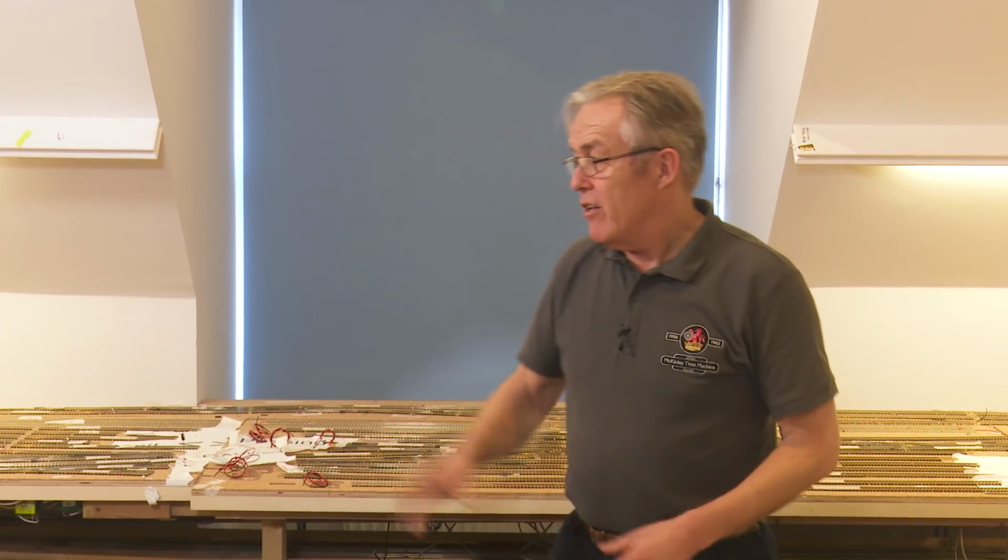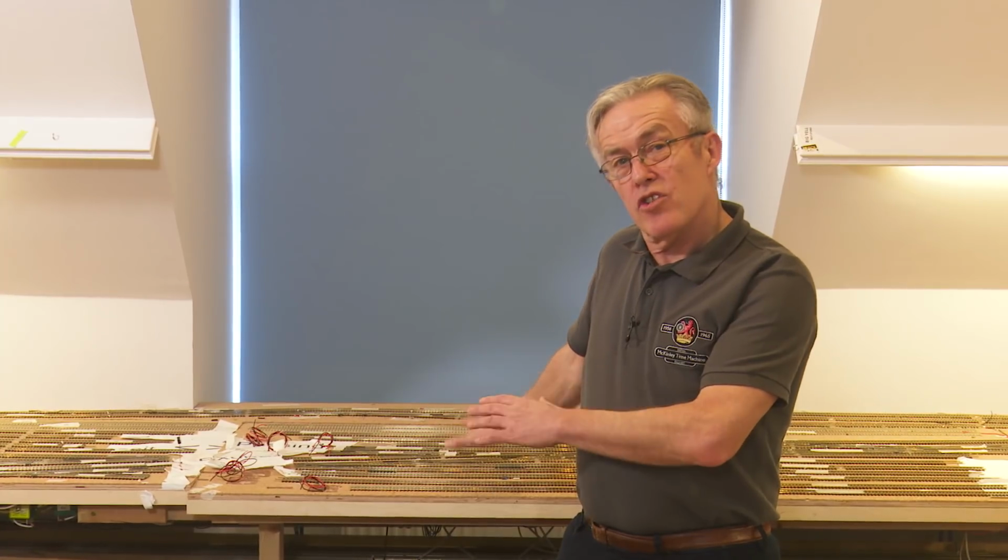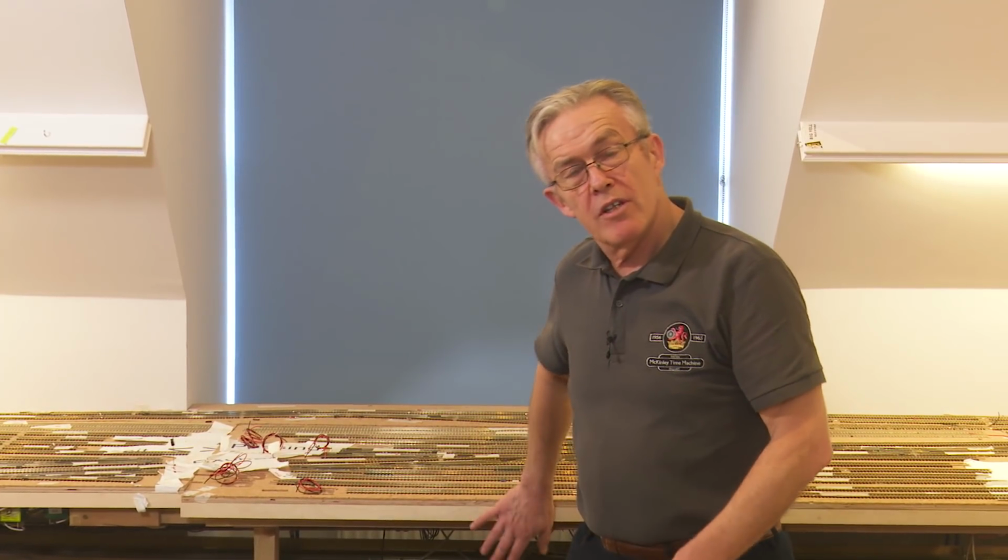All joking aside, what you see here, this is the Sheffield bit in terms of from the boards up to laying the board, so putting all that temporary track work down to prove the design that Malcolm built, designed, testing that we can operationally run it, taking it all apart again and actually wiring it all up. I wouldn't be surprised if we've expended probably 2 man-years of effort to get this far. And there's probably another 1.5 months to get all this stuff all wired up and tested.